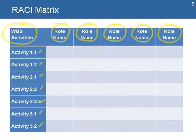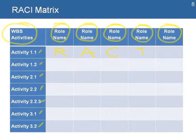For each activity, we identify the person who is going to be responsible, the person who is going to be accountable, anybody who needs to be consulted, and anybody who needs to be informed. Not everybody needs to be present as a role in every activity — there may be cases where a person is not needed for a particular activity, and that is okay.